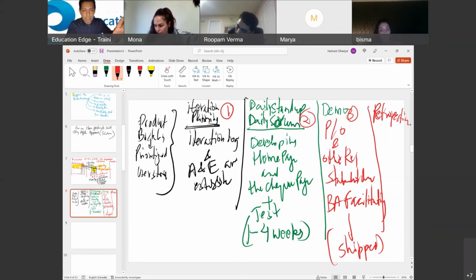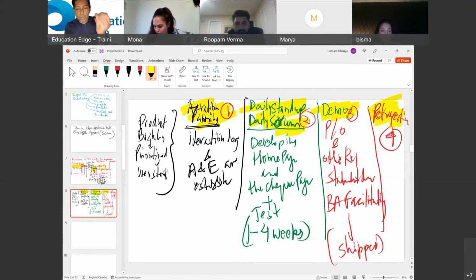So look, now this idea of Agile is based on developing a product using 4 events or ceremonies. Those 4 events or ceremonies of Agile are iteration planning, daily stand-up, demo or iteration review, and retrospective. For Agile product development, now hear this well, for Agile product development to start, your product backlog should be very stable. Otherwise, there is no Agile development, right?